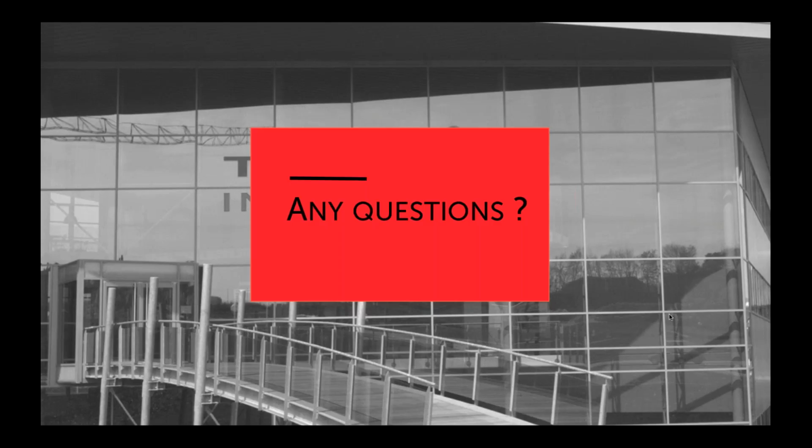So other questions? The second question for you, Raphael: did you have a requirements freeze phase? Yes, we had a requirements freeze at the beginning of the project, but we addressed new change requests continuously, dozens of change requests per year, something like this. So the requirements changed during the project.